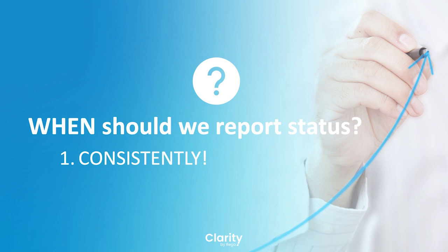If we have some major programs or long-running projects, do we really want that to be a weekly status report? Because very little might change from week to week, and so a weekly report might seem intrusive and not really deliver a whole lot of valuable information. In those cases, maybe every fortnight or once a month would be more appropriate.